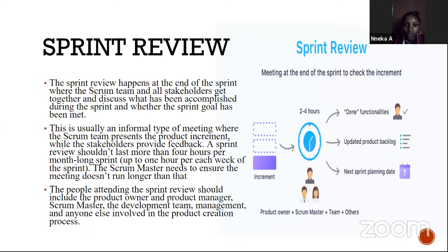Did we get all these things I was saying? Are the participants able to receive emails? Is the facilitator able to receive emails when the participant makes a submission? Are the participants able to receive emails when their assignment is due? That's what is checked in a sprint review. It happens at the end of the sprint with the Scrum team and the stakeholders. Stakeholders could be the developers, the user, the management, and the rest. And it is just to check what was accomplished during the sprint.